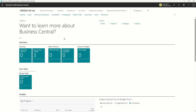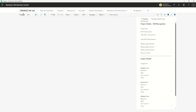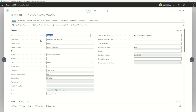Apart from all the journals you're posting against your project, at end of month finance can go to any project and create invoices — or there's a batch job to go through all projects, look at the percentage completion, and post the invoices that need to go to the client for a percentage-of-completion type. If it's payment on completion, it looks at all those flagged as completed and prepares an invoice. And importantly, this doesn't create posted documents — it creates a draft invoice you can still review before posting, where you can add a line, delete a line, or change the amount if you've made some agreement with your client.